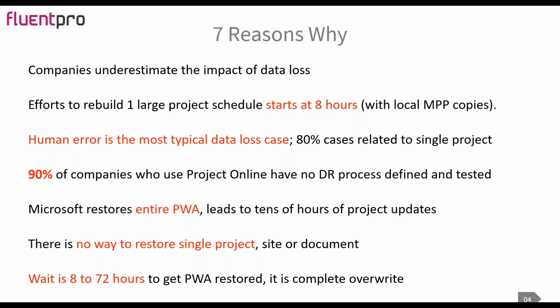It means that sometimes it's a no-go, because if you just need to restore one project, you have as a result hundreds of projects restored. Usually you simply say no and try to do everything possible manually to restore that affected project.